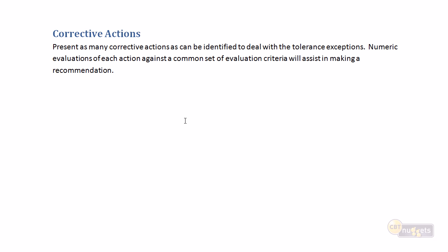What is the impact on team? What is the impact on risk? What is the impact on quality of solution? What is the impact on speed? Come up with 4 or 5 or 6 evaluation criteria. And I haven't specifically called them out because depending on the nature of the exception, you're going to come up with very different evaluation criteria. So there's not one set of evaluation criteria that can be applied in all instances, but come up with 5 or 6 evaluation criteria and then rank them.